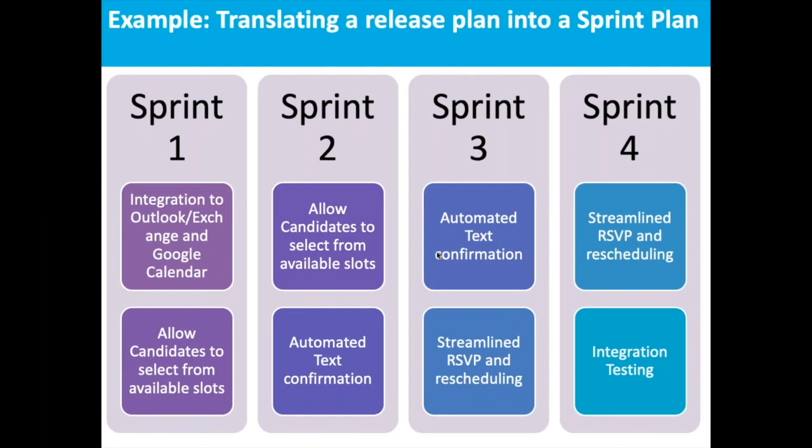That does not mean you're actually ready to put this out there or deploy to the customer. There are other activities that have to happen for each release, such as documentation, communication with your customers and your internal stakeholders, making sure that you have the release features documented, and if there is marketing required, for example, if it's a big feature you are introducing and you want to make the market aware that you are introducing this for your product, you want to work with marketing to make that enabled as well before you actually make it available to the customer.